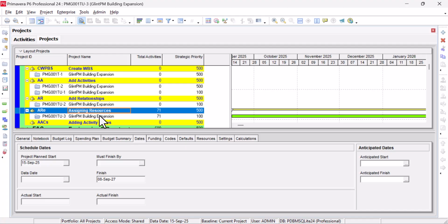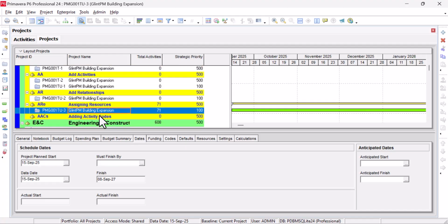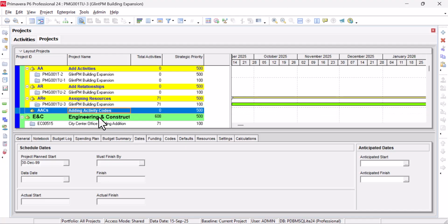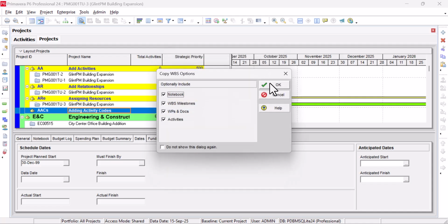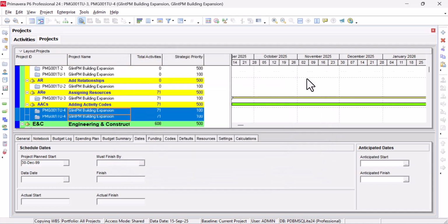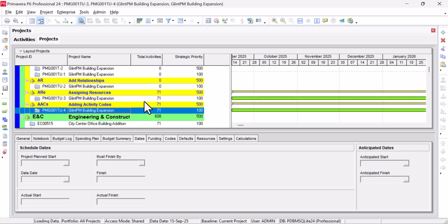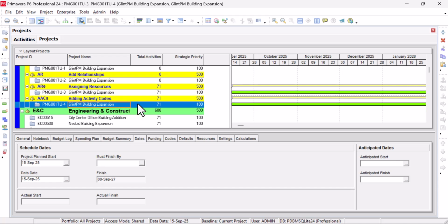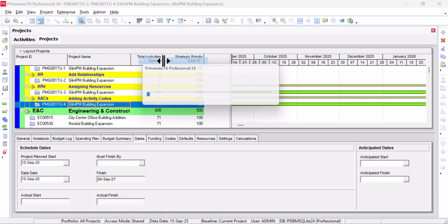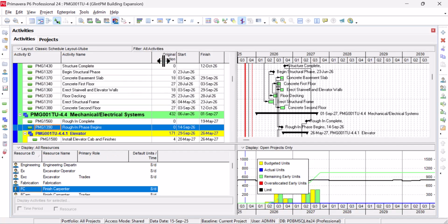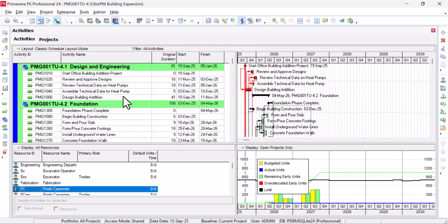Okay. So as usual, I'll just copy the project we're working on. Usually these are the good practices. You had your activities, your resources. If you have risk, you had them. If you have expenses, costs, everything, you add them to your schedule before you baseline. So open up the project now, schedule.